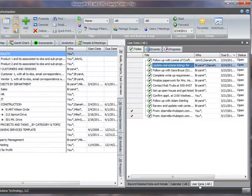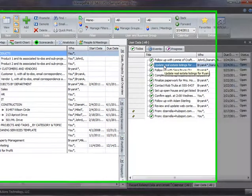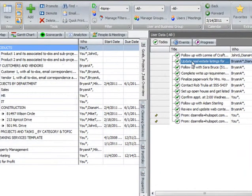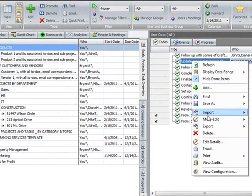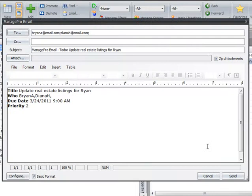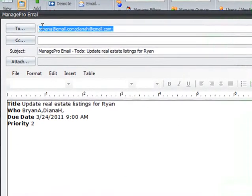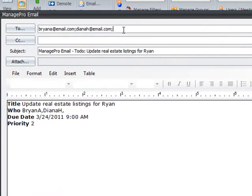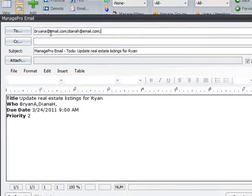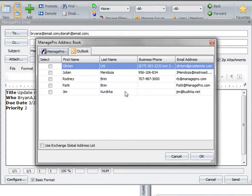First, select what you'd like to email. In this case, I'll email a to-do. Then right-click and select Email. ManagePro's email function will automatically address the email to the individuals assigned in the Who field. But you can also pull email addresses from your Outlook contact list while within the ManagePro email function.